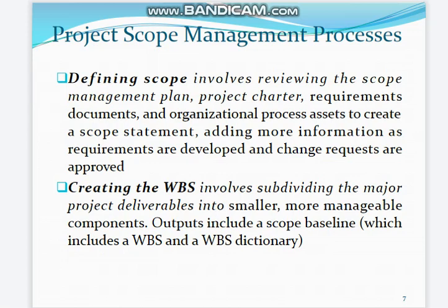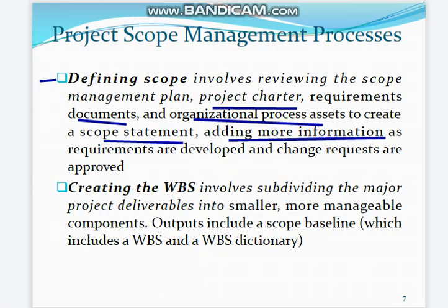Next, number three process is defining scope. What is defining scope? Defining scope involves reviewing the scope management plan, project charter, requirements document, and organization process assets to create a scope statement, adding more information as requirements are developed and change requests are approved.